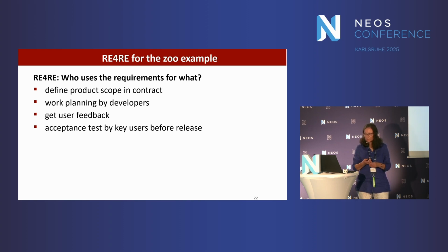And in the end, we have acceptance tests before we can send out the invoice. So we need some acceptance tests in a fixed price project, and we need to know or should know in advance what are the acceptance tests. So how will they test this website? And say, this is what we wanted. So, and thinking backwards from that, we know what we need.